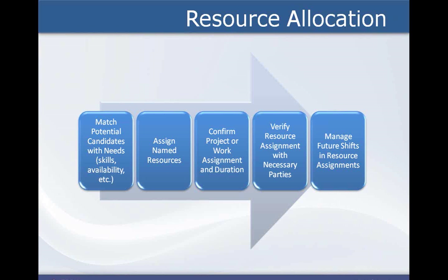In other instances, you may need to be prepared to enter a negotiation process with functional managers or maybe even other project managers should the resource be currently working on other projects. In this case, project priorities and benefits may be weighed to determine which project has the greater need for the requested resource. In many cases, if project teams are already overallocated, there may be a need to consider acquiring resources from a third-party vendor or consulting firm. You may also consider whether or not having a virtual team will be adequate for your resource management needs.